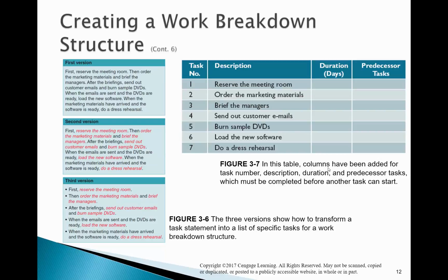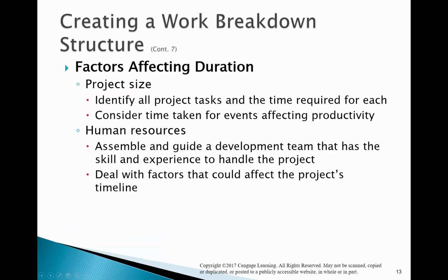How long does the flight take? Well, it takes 30 minutes. So you back that up to 10:05, and then you keep working backwards like that until you get time to actually run the helicopters or run the airplanes up to do performance monitoring and everything to get ready before the mission. So that's how you back it up and do reverse planning. That is about the smoothest way to make stuff like this work.